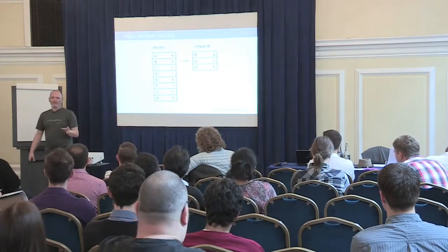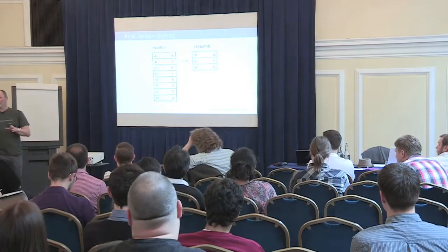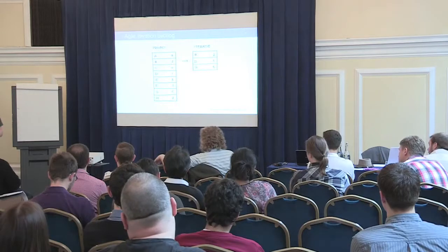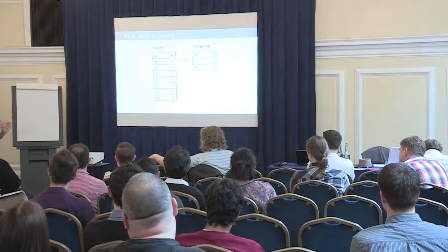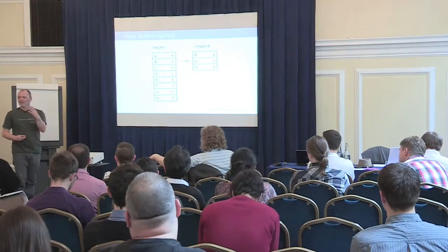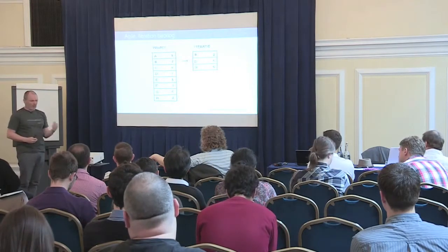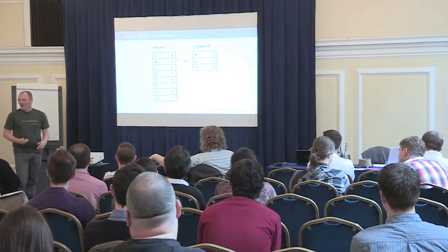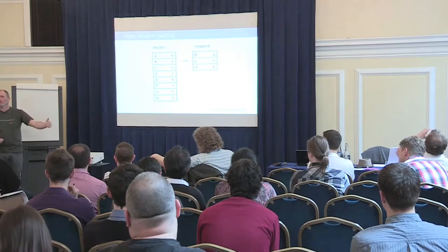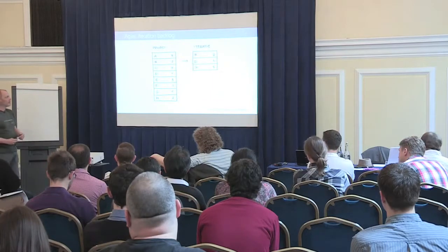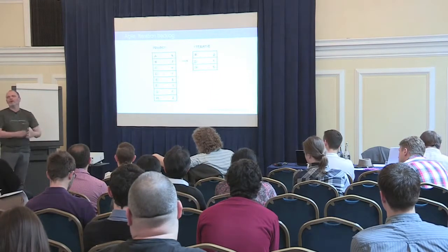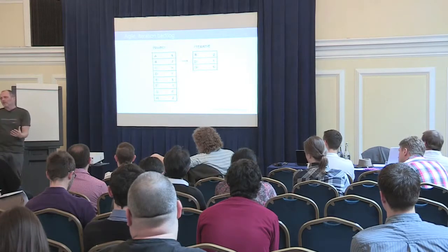So anyway, the other issue you might have is something called student syndrome. You're probably all familiar with that, right? Student syndrome is the idea that if you know that you don't have enough work, you will push it away until the last couple of days. The analogy with studying is, of course, that if you have an exam in 2 weeks, you won't do anything until the day before, right? Or even the night before, as I usually did. And then you will get into trouble because you have too much work to do in a few days. And this happens in projects as well.